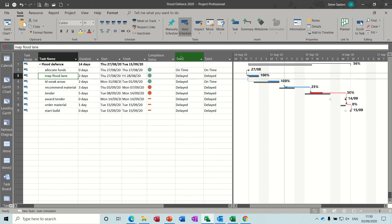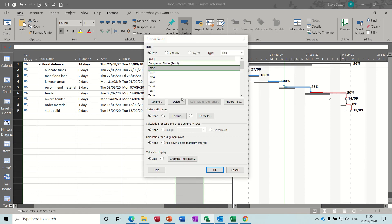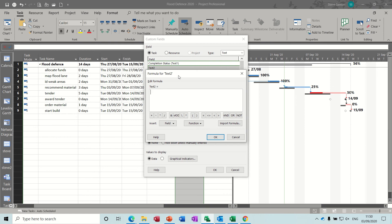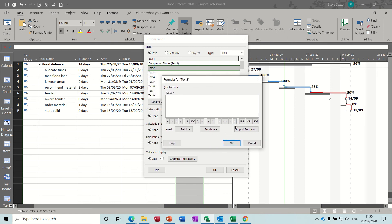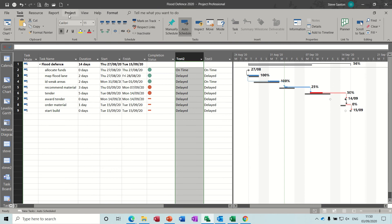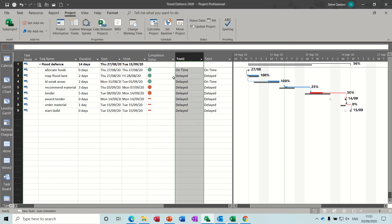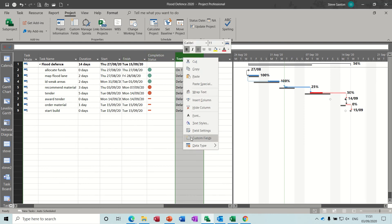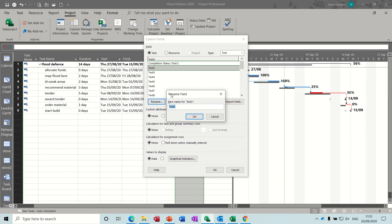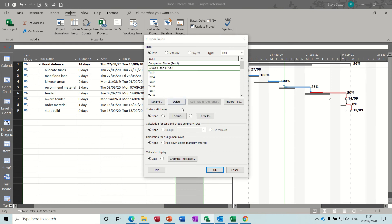Now the next one — if I go back in there it's like this because I deleted it, but it's still got the information there. So back into custom fields and formula. Before I go into the formula, let me show you: I've saved this as baseline 1 — set baseline — so there's a baseline saved there I can measure against. What I want to do now is create a field called 'delayed start' so any task that started later than the baseline planned start says 'delayed', otherwise 'on time'.